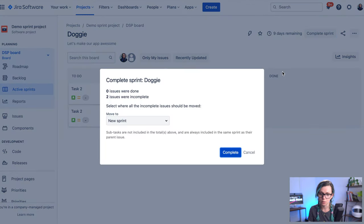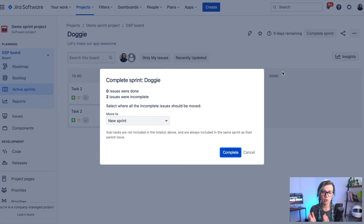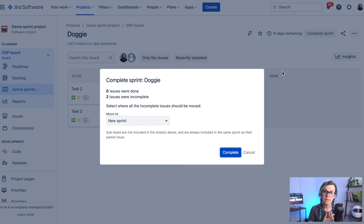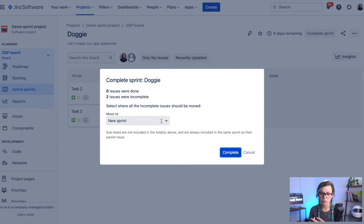So if you are ready to complete your sprint, you can click on complete sprint button and then you're prompted with this dialogue. If there are any issues that are still remaining that you didn't complete in the sprint, you can select where you would like to move them. So you can either create a new sprint or move them to an already existing sprint.